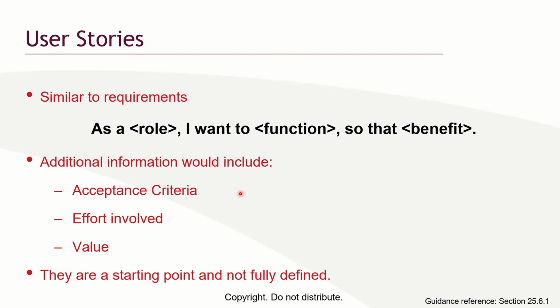The next question will be, how long will it take to create that feature, to build it into the software so that the software can remind you? Again, reminders can be done in different ways: reminder via email, or email and SMS. Those are criteria, acceptance criteria. If I remind you by email, are you okay? Or you must get SMS. Effort involved: how long will it take to create such a feature?